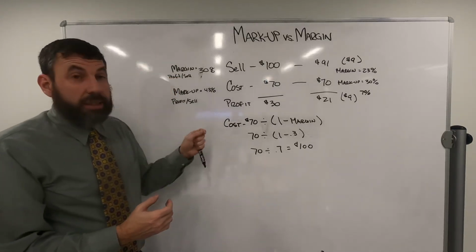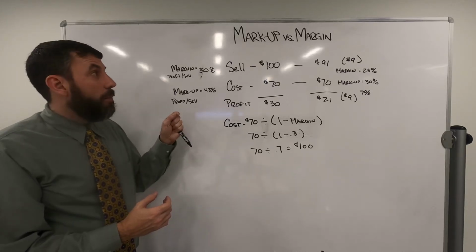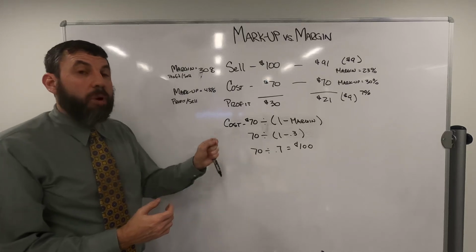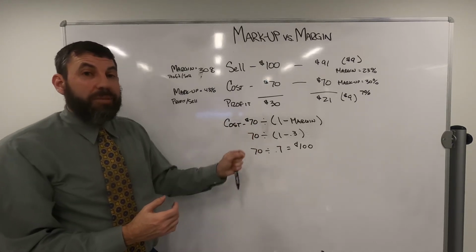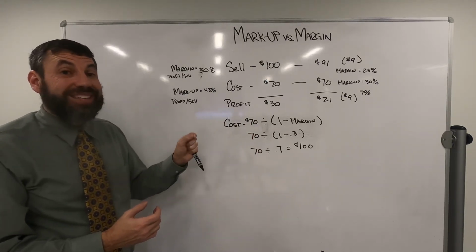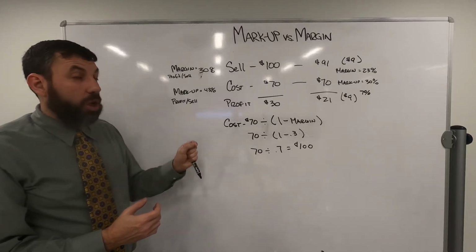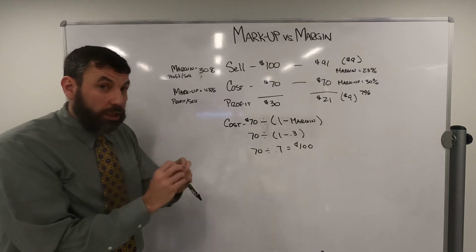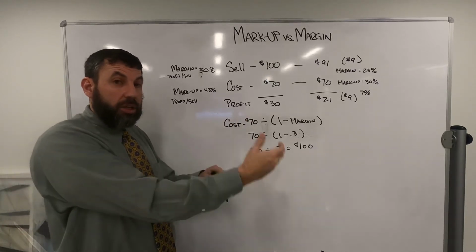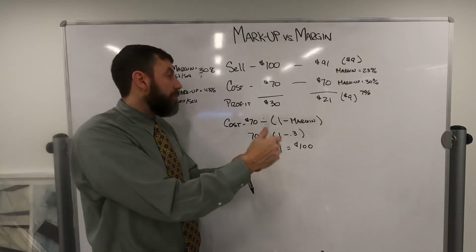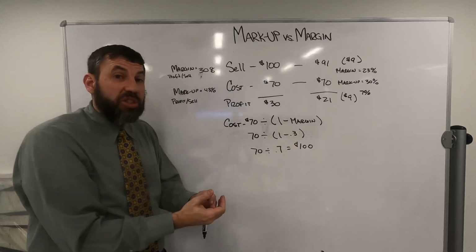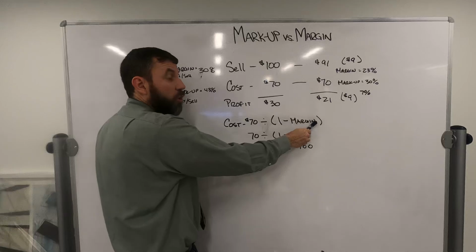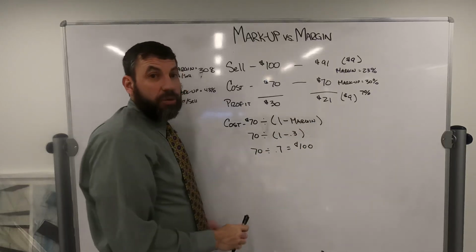So, end of the day, the takeaway: markup percentage is always greater than margin. If you know the margin you're after, your markup has to be greater, sometimes a lot greater. If you know the markup, you take your cost times 1 plus that amount. Most situations, you know the margin. So you take your cost divided by 1 minus the margin percentage, and that gets your number.